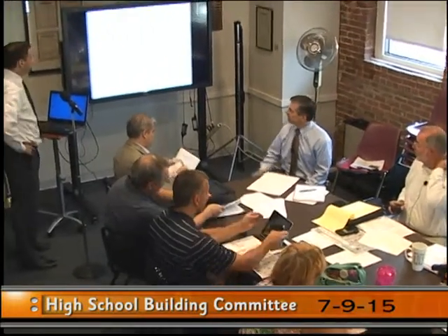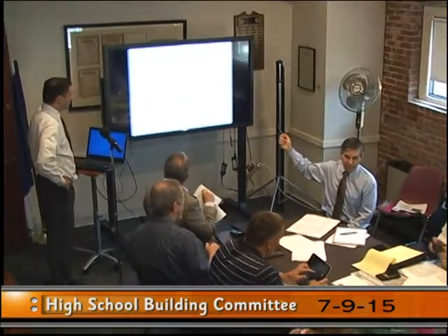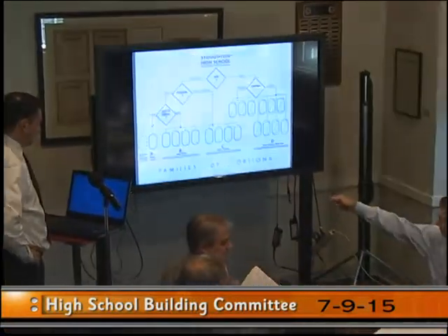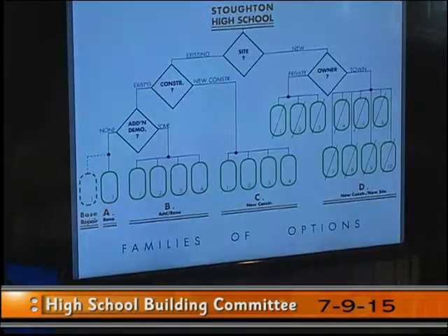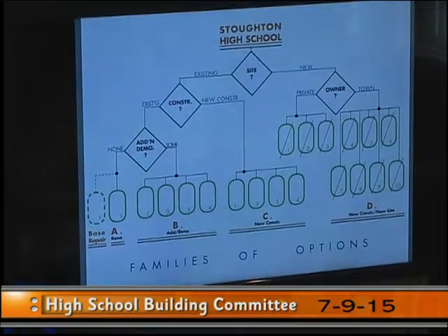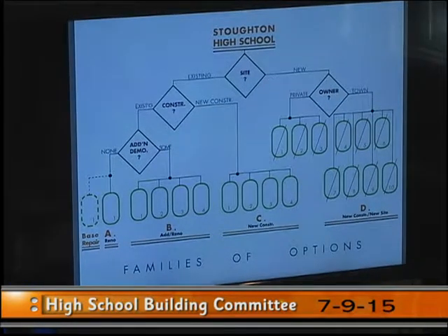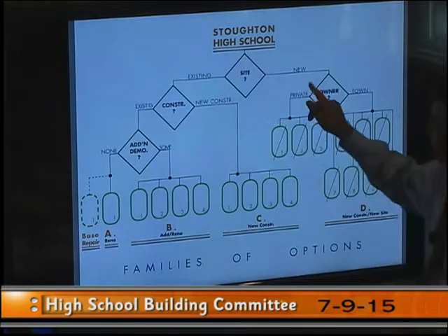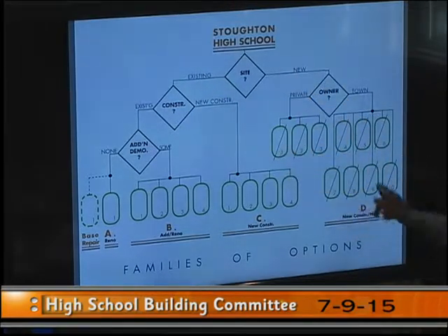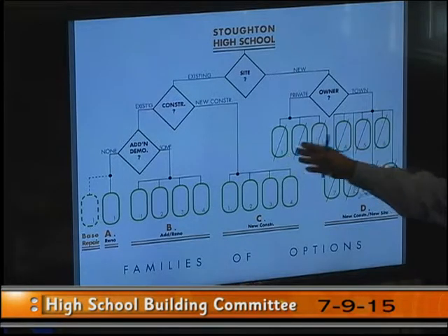Great. Well, anticipating that, we produced the graphic that's in your handout, which is a format we've used before as a decision tree, where every diamond is a decision, and the green rectangles at the bottom are the options, theoretically. Although they are probably fairly close to the number of options that we'll end up looking at. So we just made the first decision, which site, the existing site or new property. So all these are crossed out. We did look at 10 properties, and so those are off the table.